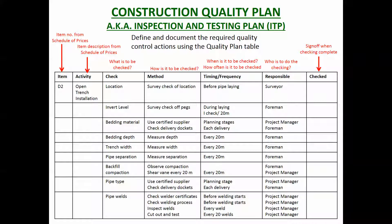What comes out of it is a construction quality plan — you put all that into a table. For a bigger project it will be much more than this, but let's stick with this table. The first column is the item or WBS work package number. Then: what is to be checked — the location of the pipe, the invert level, the bedding material, the bedding depth, trench width, pipe separation. Then the requirement you're checking against, and the method — for example, a shear vane test for backfill compaction.